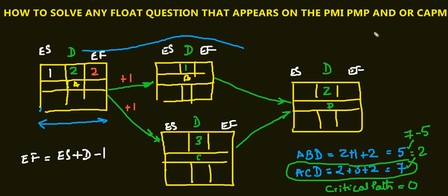Let me just give you a brush up. What does it mean? Early A finished on, let's say, day 2. The next activity will start after A finished. Finish, start. Okay, next day. I always told you, remember, it's always a finish-start relationship.